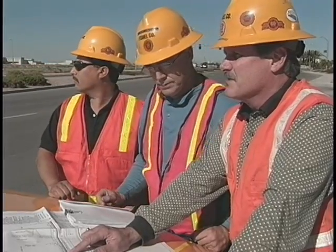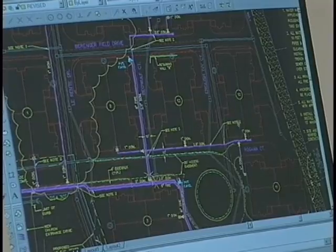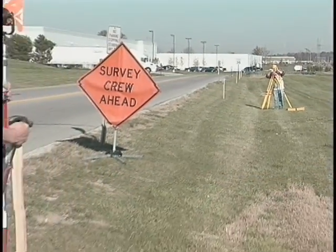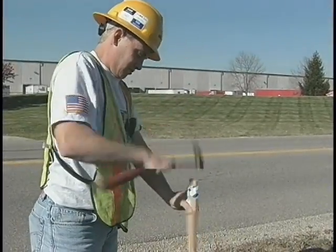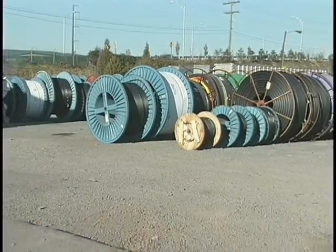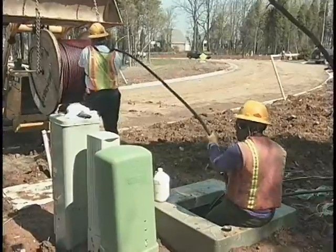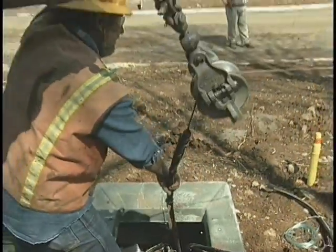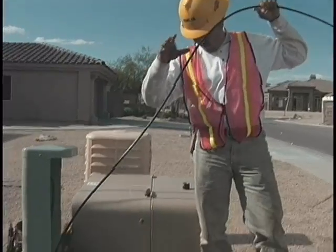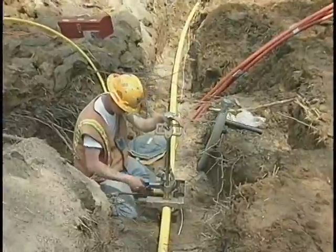Construction projects begin with a meeting between representatives of the utilities and the Fishel Company to identify road crossing points on prepared plans. Next, Team Fishel conducts a pre-construction survey to make sure the site is properly graded and all property corners are suitably marked and set up correctly. Meanwhile, Fishel has begun warehousing all materials the project will require and will manage both inventory and just-in-time delivery for maximum site efficiency. Once the installation is complete, Team Fishel crews pull cable and set all equipment to the proper specifications. In addition, we set all streetlights, cable TV, and telephone pedestals, terminate transformers, and tie in the gas.